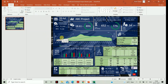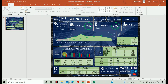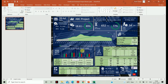Then the Financial Status section shows the cumulative planned versus cumulative achieved data. The next part is your Milestone chart, which shows the inflow versus outflow projection — specifically the sales inflow versus execution outflow. The green bar is your inflow and the red bar is your outflow. After that are the Key Issues that your management wants to see, so they can understand the issues your project is facing.